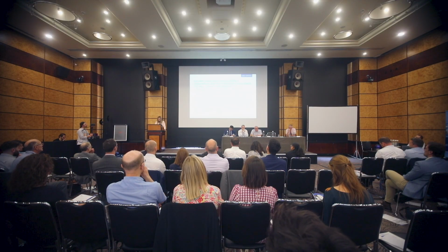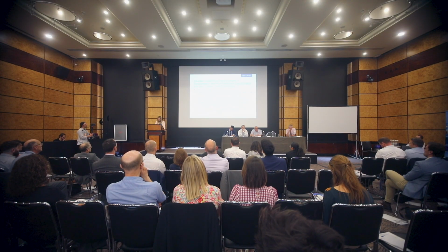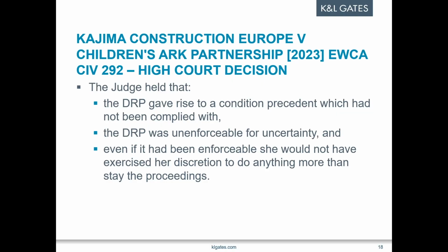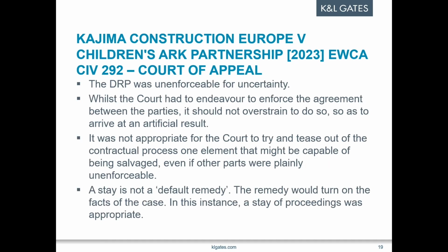So the TCC decided that compliance with the dispute resolution procedure was a condition precedent that had not been complied with. But in any event, the dispute resolution procedure was unenforceable for uncertainty and lack of clarity. The judge stated that had the dispute resolution procedure been enforceable, she would have stayed proceedings rather than striking out the claim, and that a stay was the appropriate or default remedy.